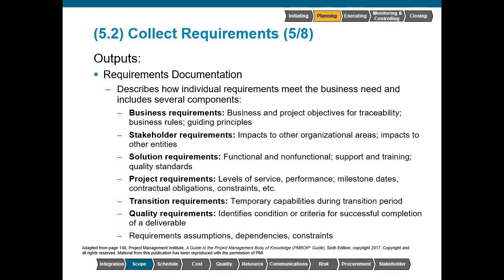With the transition requirements, what do we have to do once the project is done, once the deliverable has been completed? Do we have a 30, 60, 90-day warranty period where we have to have engineers on staff to troubleshoot? Or is it simply a matter of delivering it to the customer's location, dusting our hands off, and calling it a day? And finally, we have our quality requirements.